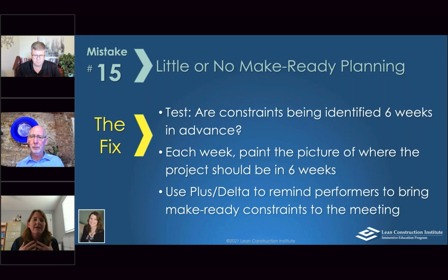In that meeting, create the vision, make a description. Hey, in 6 weeks, we're going to be doing the paving out in the north lot. We're going to be taking down the tower crane. We're going to be putting in the doors and windows and starting to really finish up. And then ask the group, okay, what do you envision you have to get done during that time? And is there anything that could stop you from doing it?